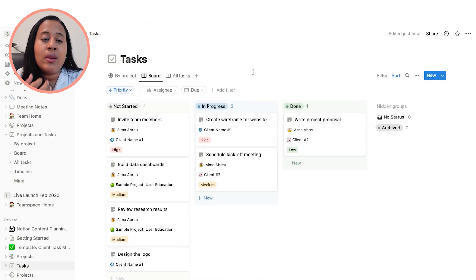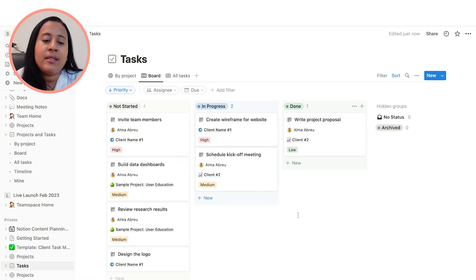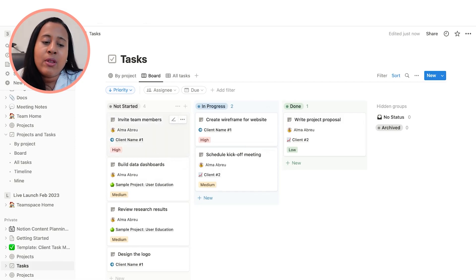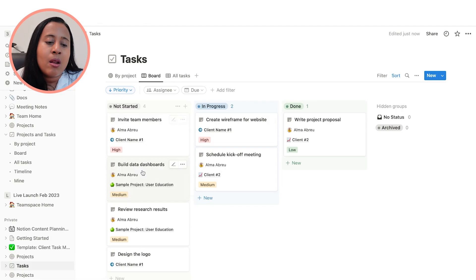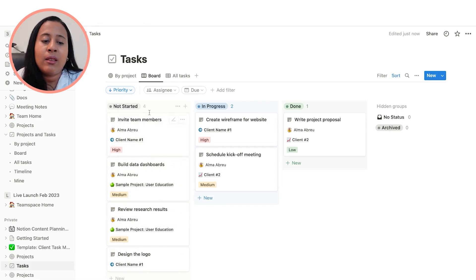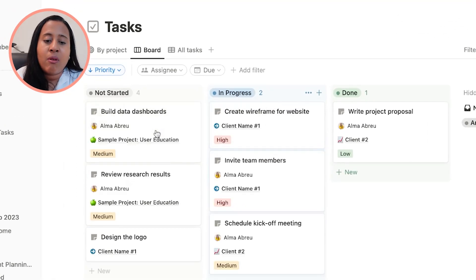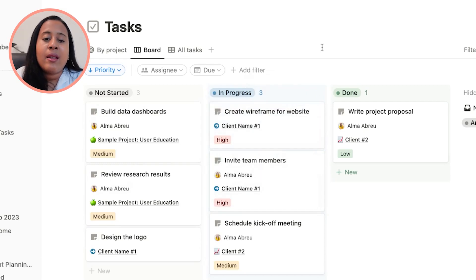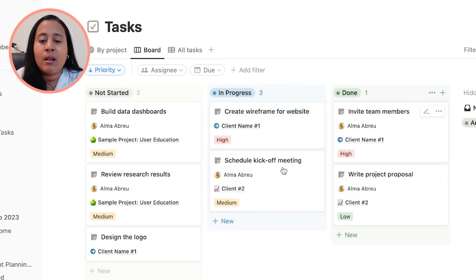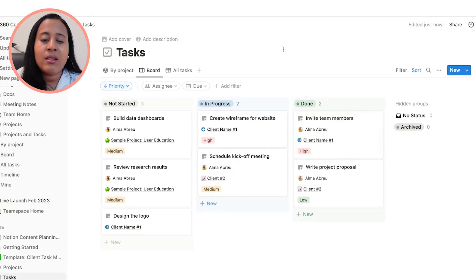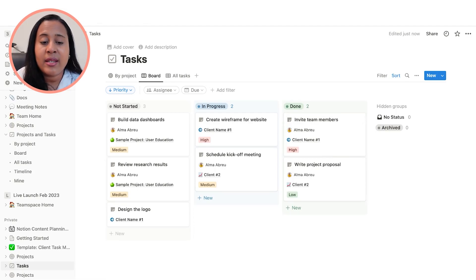Another thing you can do is you can look at this from a board view. This has different swim lanes and these are the different types of statuses. So instead of looking at it as a grid view, you can actually take each task and group it according to the status. Right now you have a bunch of tasks that are in the queue. You haven't started it. Once someone on your team decides to start working on a task, you can drag it over to the in progress column here. And then once they're actually done, they can go ahead and drag it over to the done column. That's how you would basically manage the status and the progress of every single work item that you have for your team.